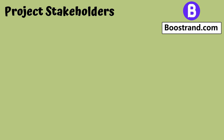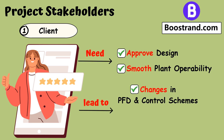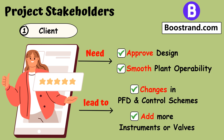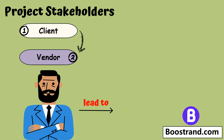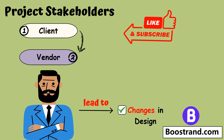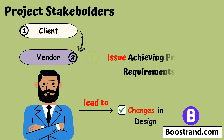We shouldn't forget that the engineering company is not working on its own. There are other project stakeholders and considerations, such as the client or plant owner who needs to approve the design. They may have requirements to ensure smooth plant operability, which may impose changes in PFD and control schemes, add more instruments or valves. Vendors of equipment and instruments may also need considerations that can change the design — for example, we may find that vendors of a compressor or a control valve cannot achieve the requirements provided by the engineering company.